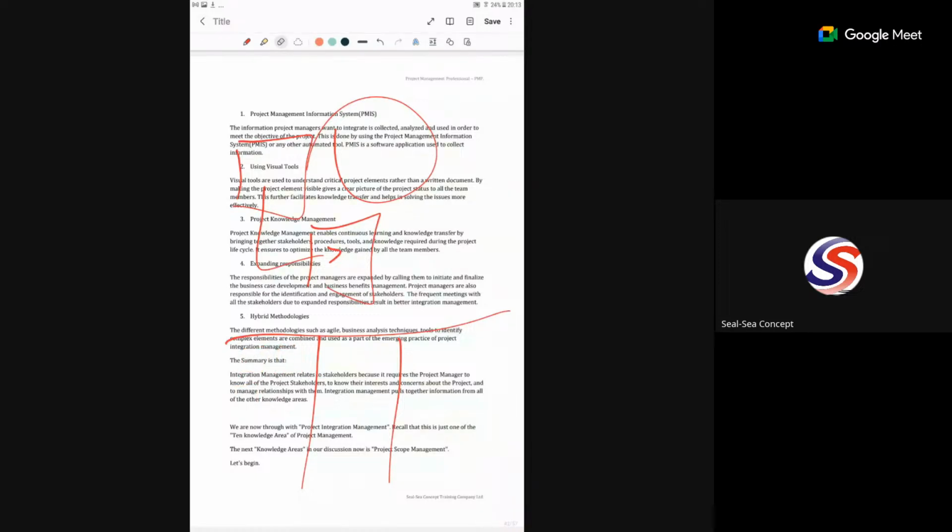We call it backlog. We call it backlog in project management. Backlog is where we are logging all the requests or all the tasks that we need to actually perform. So in the heading here, you will see task. We use WBS for this task. We call it work breakdown structure, that is under project scope management. What we use work breakdown structure for is to look at a particular task, and then we break it into pieces in such a way that it's not going to look cumbersome. It's not going to look complex.